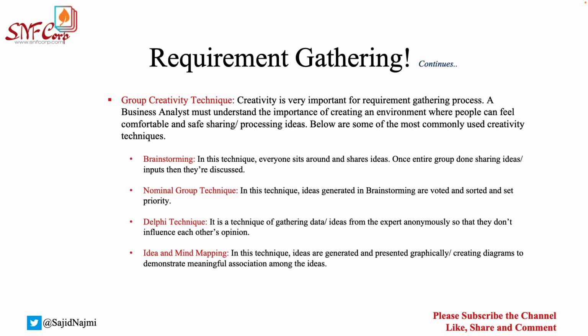Now, what is Delphi technique? This is a very common question. If people do not ask you about brainstorming, they will 100% ask you what Delphi technique is. Delphi technique is nothing but capturing the requirements anonymously. You do the same thing, but no one knows what information or idea is coming from whom. It is anonymous. And why do we do this? As I just said, in one room, I may have one junior resource, one senior resource, someone from management, and I don't want anyone to get influenced by someone else's ideas and insights.